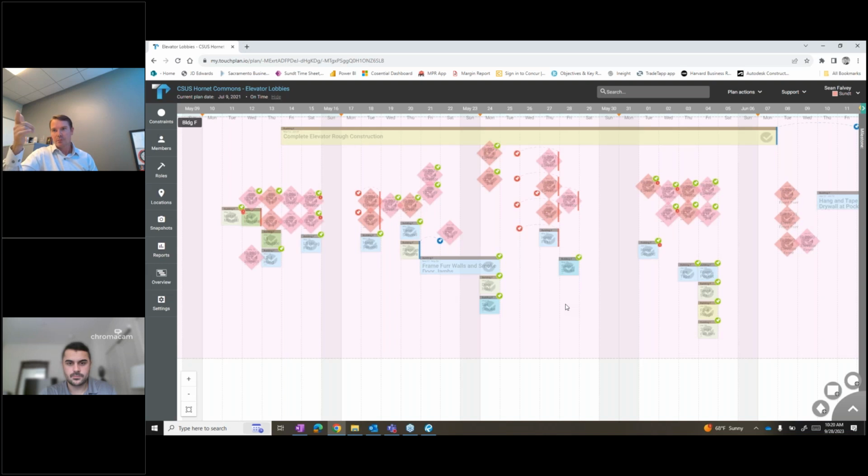And that's something that, like, the framer might say, hey, I'm not hitting this. I need one more day. Okay, let's make that adjustment. Let's look at what it does to your activities up and down the line from a manpower standpoint. Let's see how that affects our inspection schedule down the line, because we're also watching that. There's only so many inspections we can execute in a day.